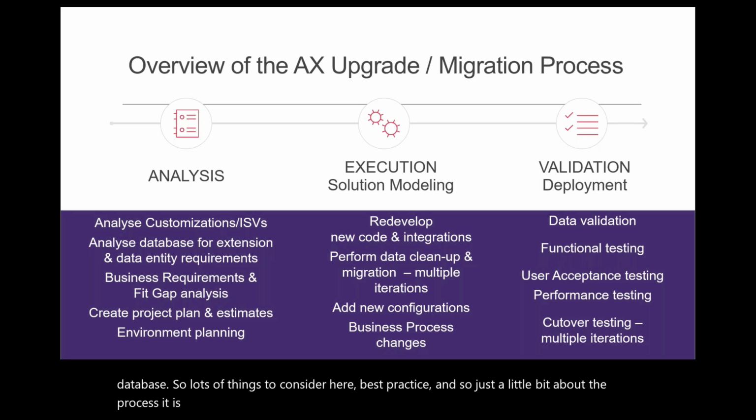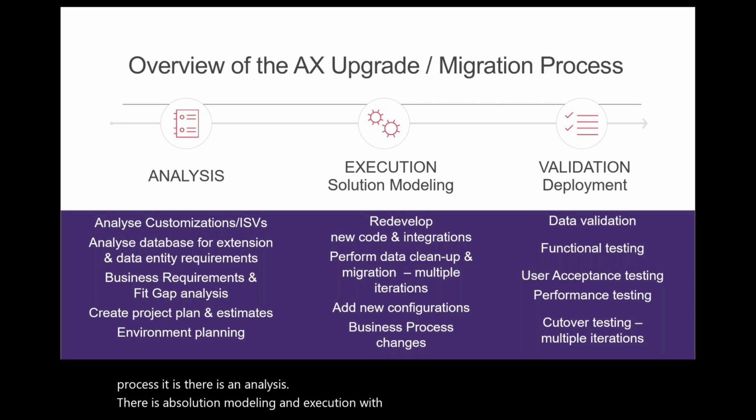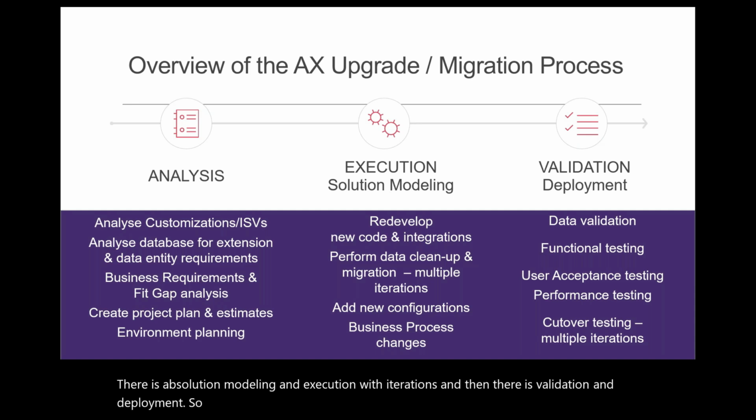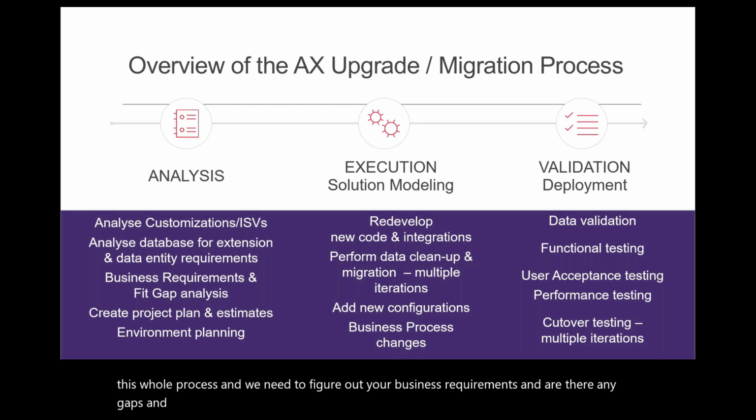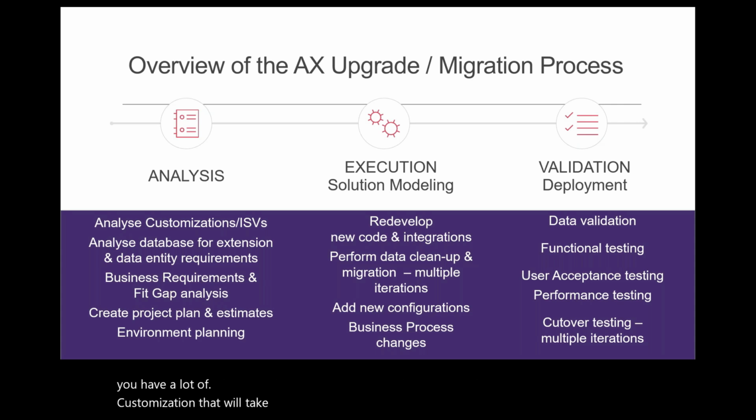There is an analysis. There is solution modeling and execution with iterations. And then there is validation and deployment. So the analysis, there's a small analysis and there is a more extensive analysis of this whole process. And we need to figure out your business requirements and whether there are any gaps, and then project planning, environment planning, and the biggest part of the analysis, if you have a lot of customization, that will take the longest. So that's just something to consider.